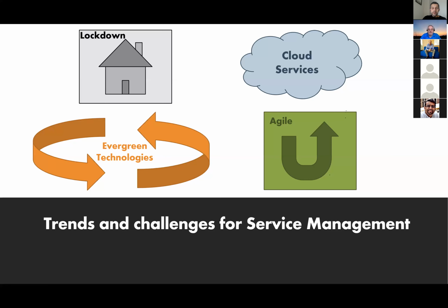In terms of change management within projects, good practice would say that you would define the scope of a project. So what it's delivering, who to, how many, and so on would be defined up front, typically as part of the project initiation document. Change management as part of project or program management would be when something has changed. So it would be, we've now found that we need to introduce another 1,000 laptops, or we've just gone through a merger and we need to think about what the new organization is going to do, and projects currently in flight need to adapt to that. It could be that a vendor has changed something and we need to accommodate that. It could be that the project is delivering ahead of time or slightly behind and needs more money.